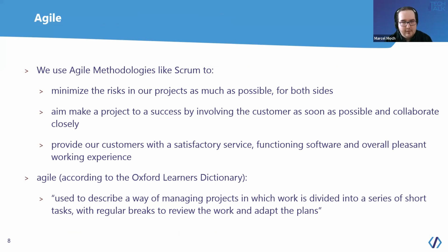As Patrick already has mentioned, we usually prefer to work in agile mode. There are other project management methodologies available also for software development. But as I said, especially if the project you're working on does not have all the requirements defined in a certain way in the beginning, or if you expect, and this is one big point here, to have some changes within the project, you might want to go with the Scrum methodology, as we do.